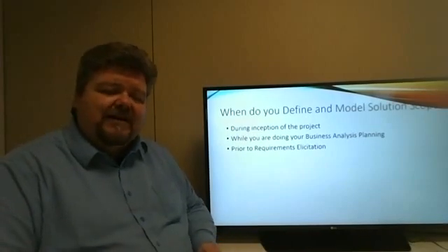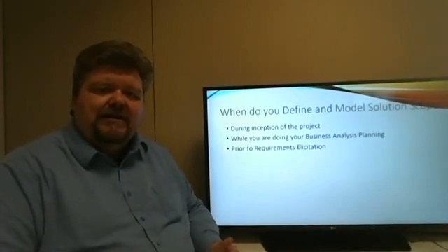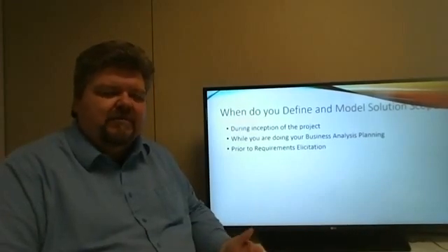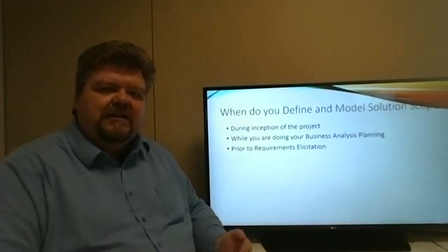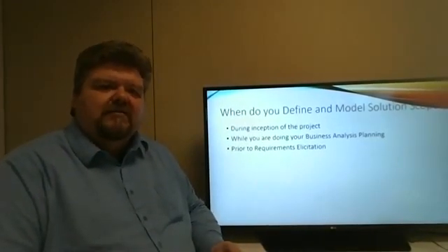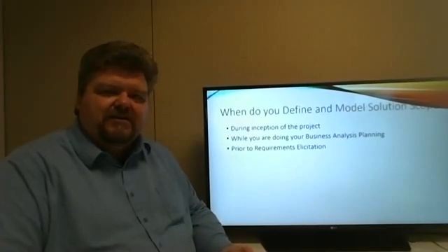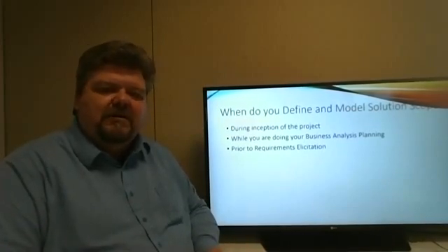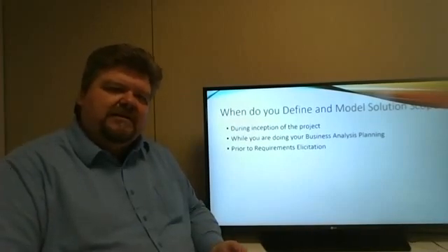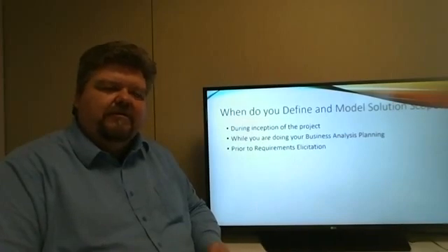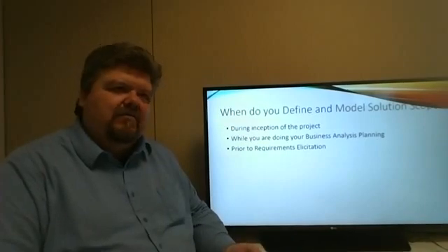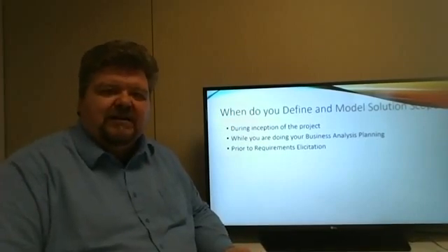You would actually be defining and modeling solution scope in the very initial phases of your project, initiation or inception, by whatever name you may call it, when a business analyst is first engaged in the project. And when you are doing business analysis planning, one of the first tasks you will undertake is defining solution scope. Because business analysis planning, you are planning and defining your approach to the project, what tasks and what techniques you will do throughout the project lifecycle.